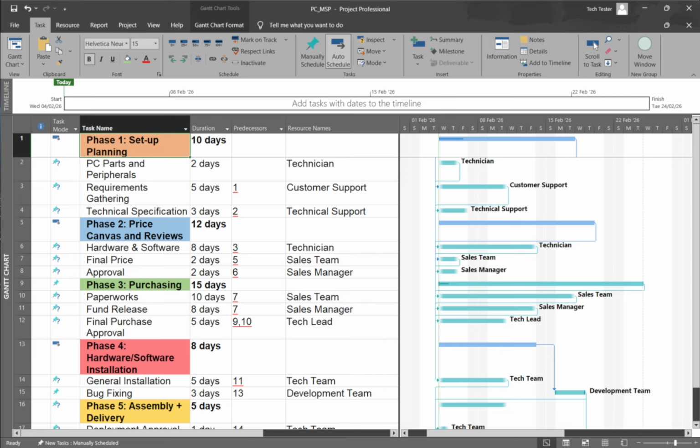Just be mindful that percent complete is time-based for duration. It doesn't necessarily reflect effort unless you also manage work fields. Use it regularly and avoid marking tasks 100% until all deliverables for that task are truly finished.